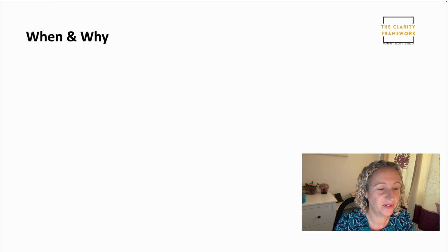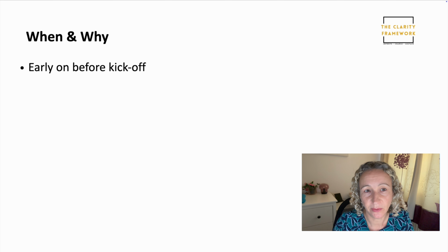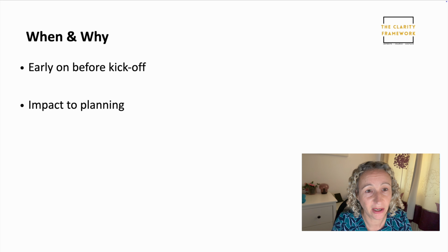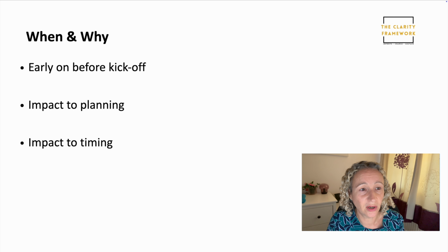Okay, so first of all, let's think about when and why we would do a change readiness assessment. Well, first things first, we get it done early doors, before we start the kick-off process. And why is that? Because first of all, it's going to have an impact on our project planning. When we do the change readiness assessment, it's going to uncover some things that maybe we didn't know before, that we're going to want to mitigate against or plan into our project plans, our action plans, and our communication plans. So let's get it done early on.